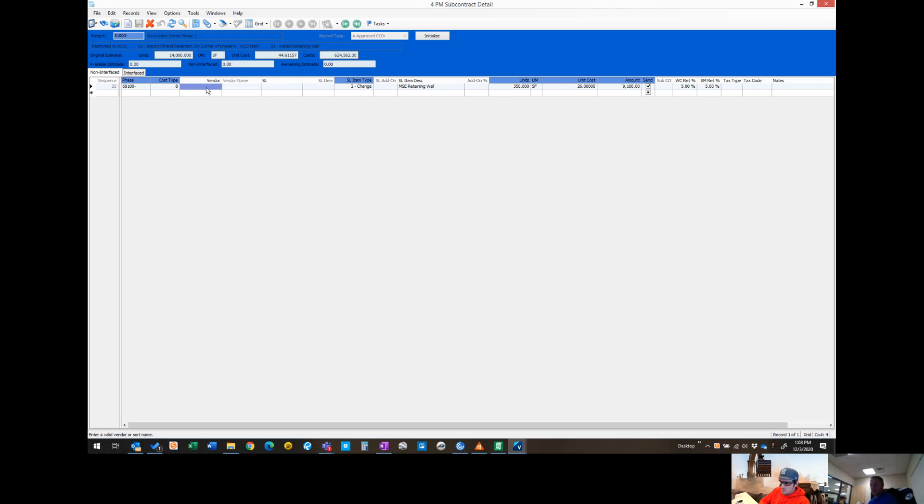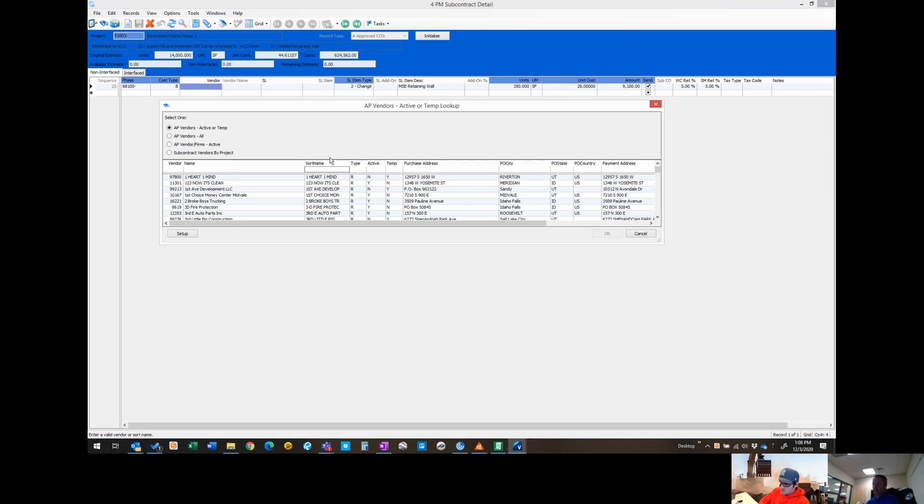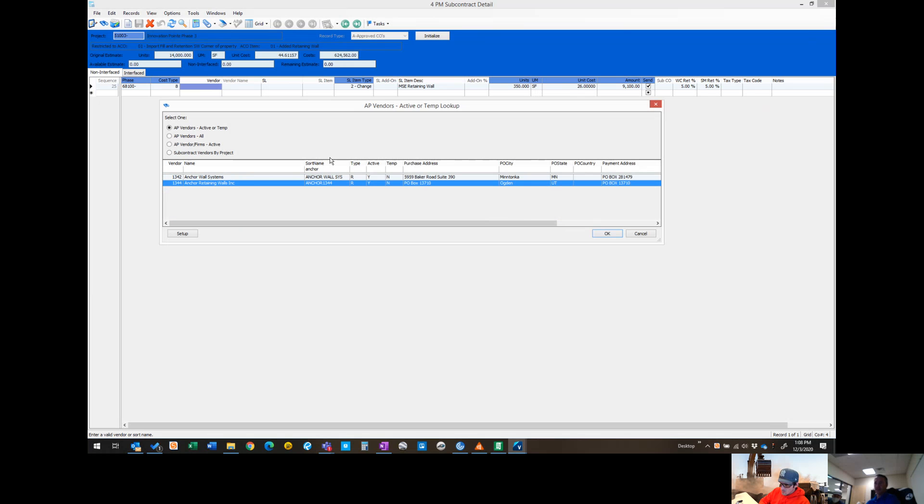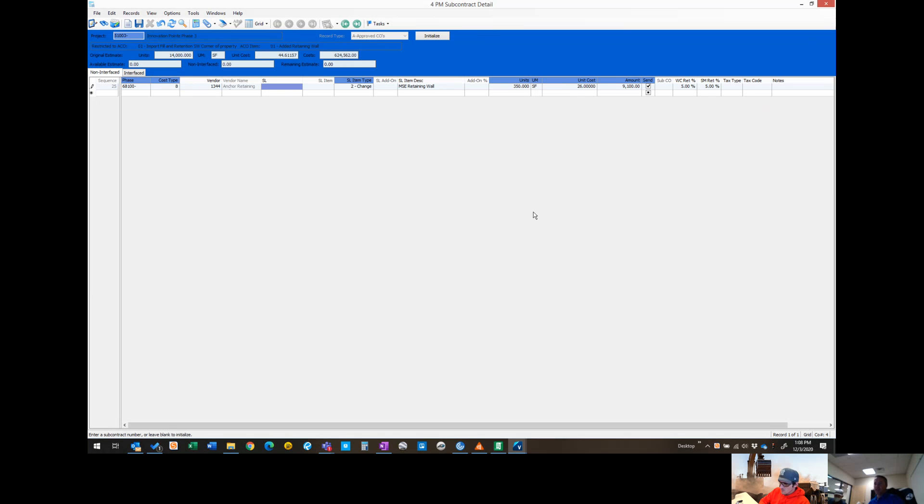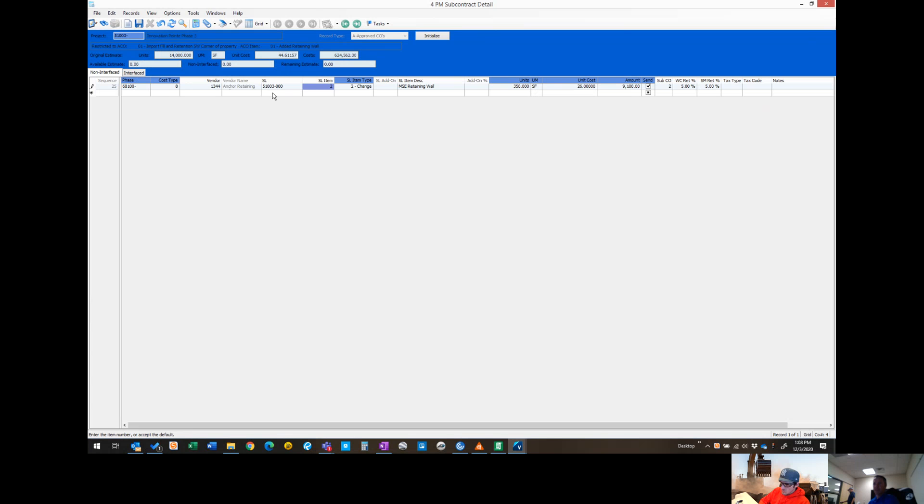We need to come in and get our vendor. I'm going to do an F4 and search for anchor walls, anchor retaining walls. I'm going to add them in. I'm going to do an F4 on our subcontract. So this is their original subcontract. Now this is going to be item 2, which is a change order. This is all in the system now, assigned to anchor walls subcontract.